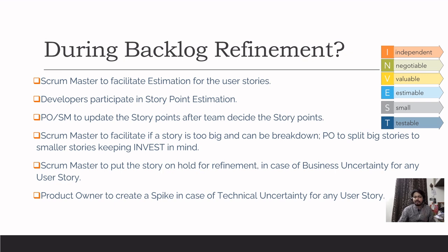Now there is this healthy conflict, and the product owner being a person from the business side, he may not be able to answer that. So what the product owner can suggest, or even if an architect is there, he can suggest, let's do a quick spike, try out both the approaches, see what the pros and cons are, which is more feasible, and then we can decide. It will help us to decide which approach will work. And until we do the spike on both approaches, let's park it.